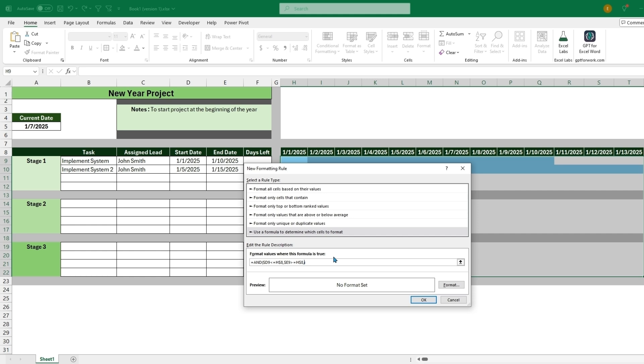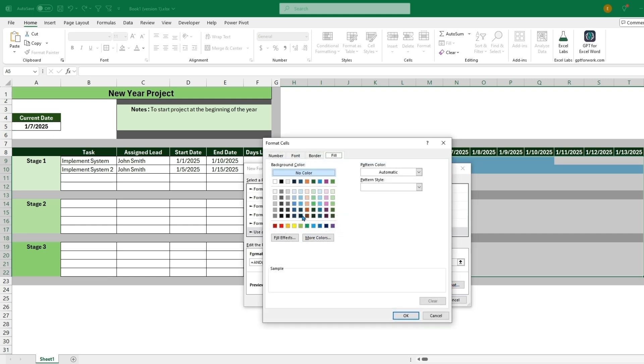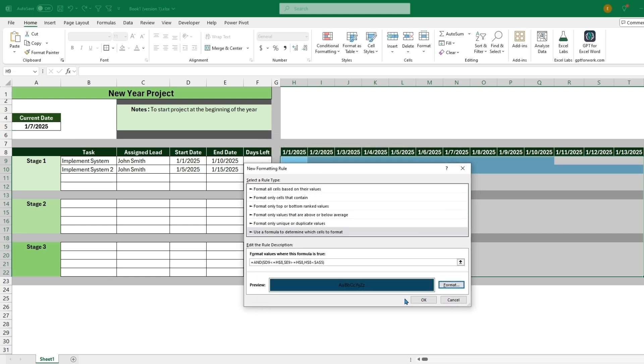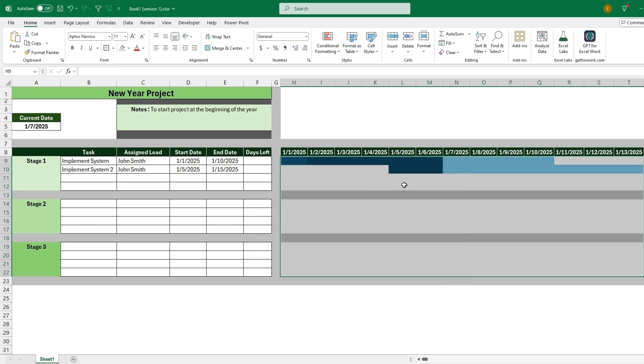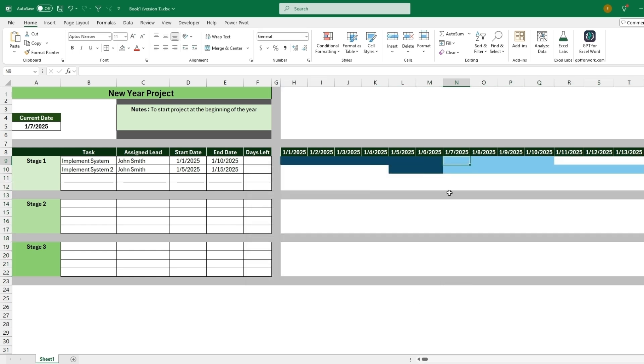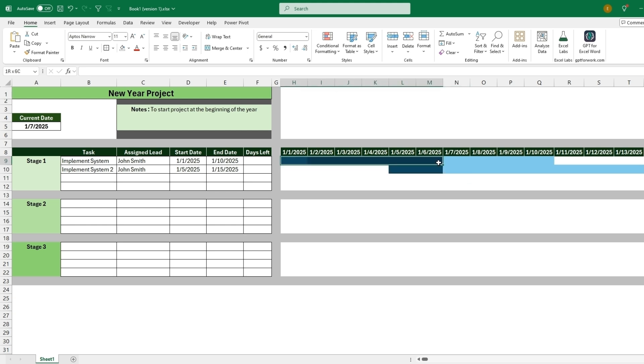We will put this value, which is H8, but we want to get rid of that dollar sign to not make this a fixed column, is less than this value, which we can just leave as a fixed value since it's just a current date. So we can make this a slightly darker blue, meaning that these days have already passed. You could also make it less than or equal to to also include these days. So then this is one way to already show what days have passed and know what days are yet to come.